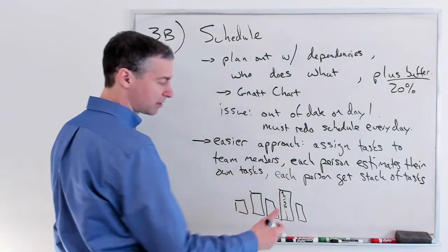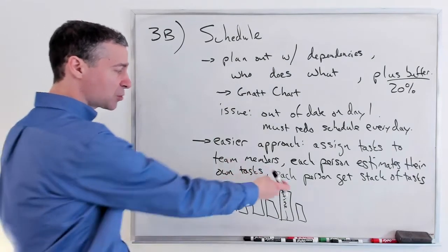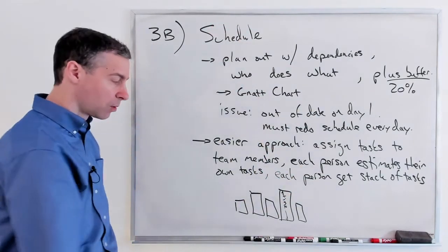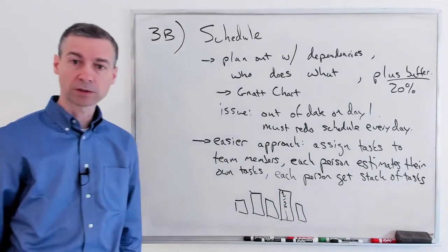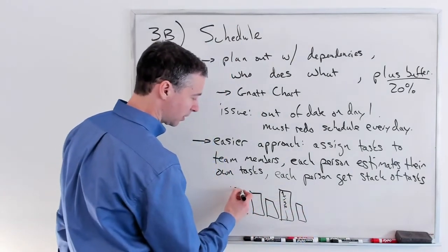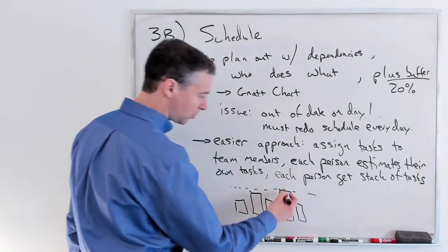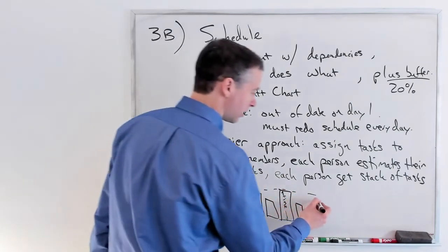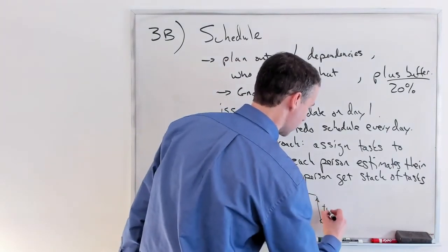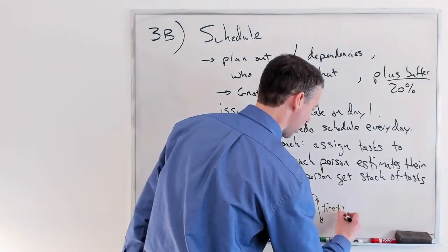That's what the height of the stack really represents. If this person worked from now through all their tasks, what do we currently estimate their total time to be? And so when you look across a team, you just find the tallest stack, and that amount of time is the time till the project is done.